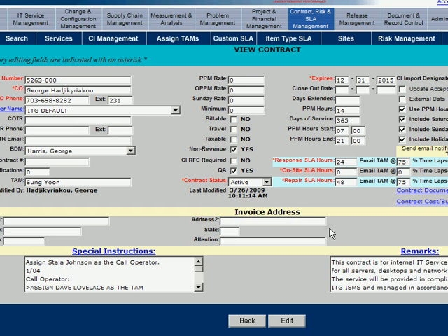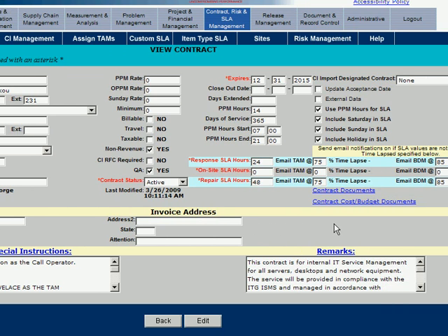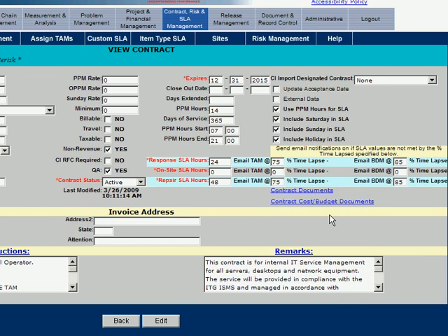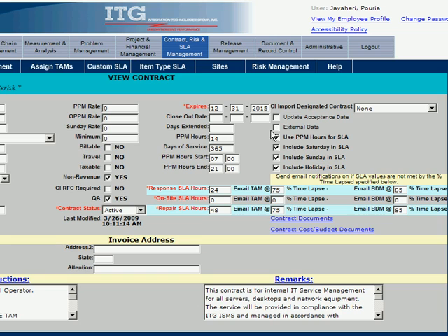To set up active timesheets for resources, the following steps must take place. Step 1. All outgoing or active contracts must have a future expiration date as depicted below. This is important since all active projects must exist under valid, active contracts.